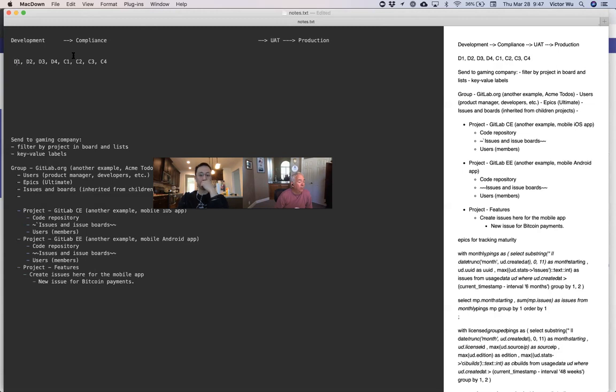So yeah, I hear it. This is where an organization, a business may say, I expect this to happen from left to right in order. They might want to impose that rule in their organization. They might say C4 must be complete before we go to UAT, before proceeding. This is where being able to define the business rules around these events matters. We're going to need feedback from the community. But I think the business rules will exist at this layer more so than the top.